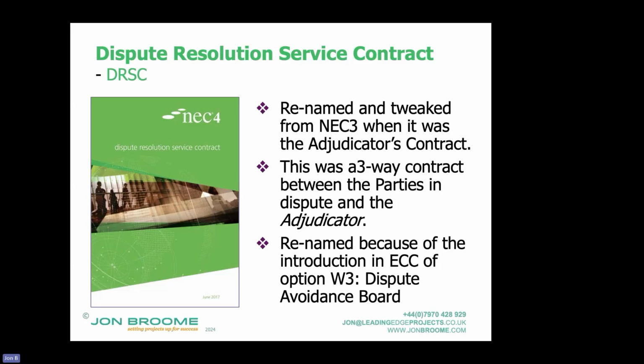That would be with an ongoing involvement. The participants can say, we've got a problem, can you give us your opinion on it? But it's not contractually binding. But if you were to have a dispute avoidance board, this would be the contract you'd employ them on. And if you do go to adjudication, it's also the contract that you use them on.